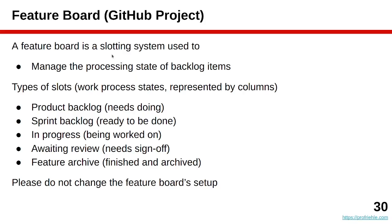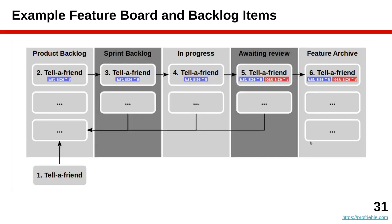The feature board is a slotting system with multiple columns, each representing the processing state of work that needs doing — called backlog items in Scrum. The columns are: product backlog, sprint backlog, in progress, awaiting review, and feature archive — left to right. These are the stages of fulfilling one particular backlog item like a feature request. To the left is the product backlog, a long list of features and requirements to be implemented.